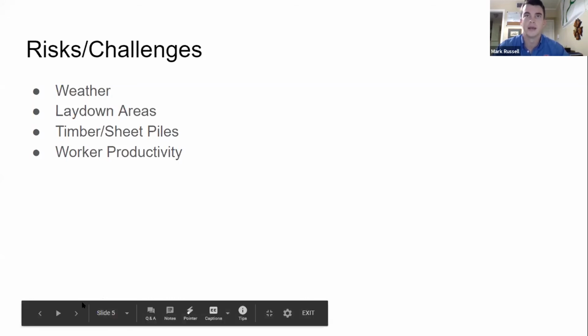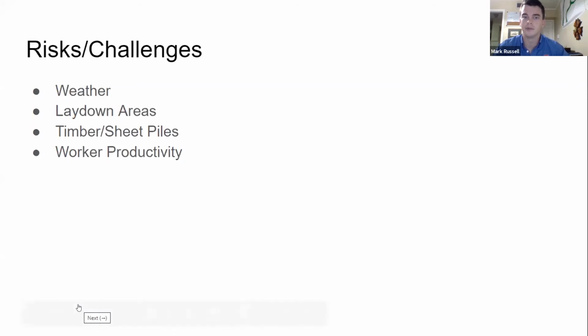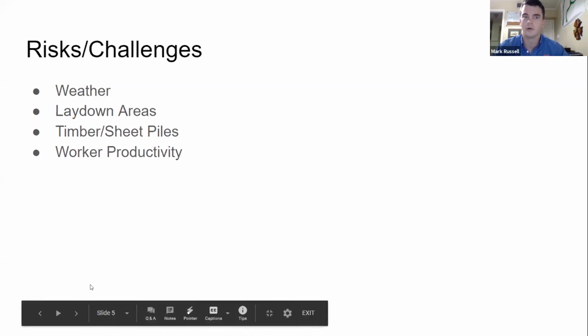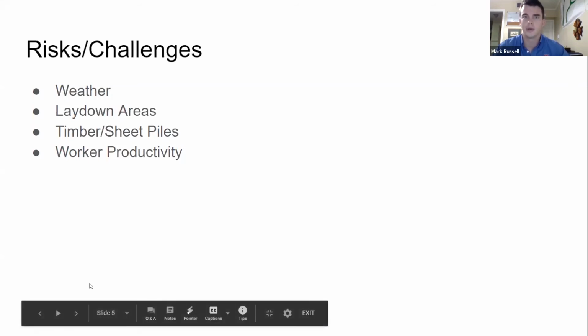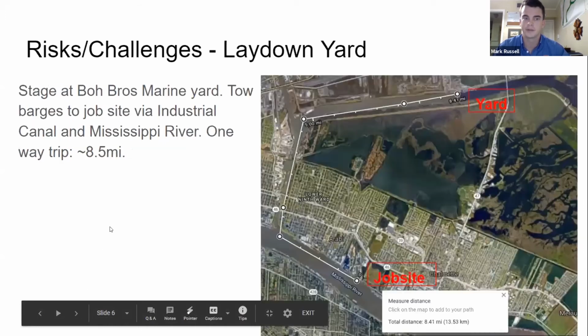We looked at 10 hours for 5 and 6 days. We looked at 12 hours a day for 5 days, and we eventually landed on doing 12 hours a day for 6 days a week. So giving them Sunday off, working Monday through Saturday. And we ended up with a 10.5-hour productive day for each day doing that. And yeah, next slide, please.